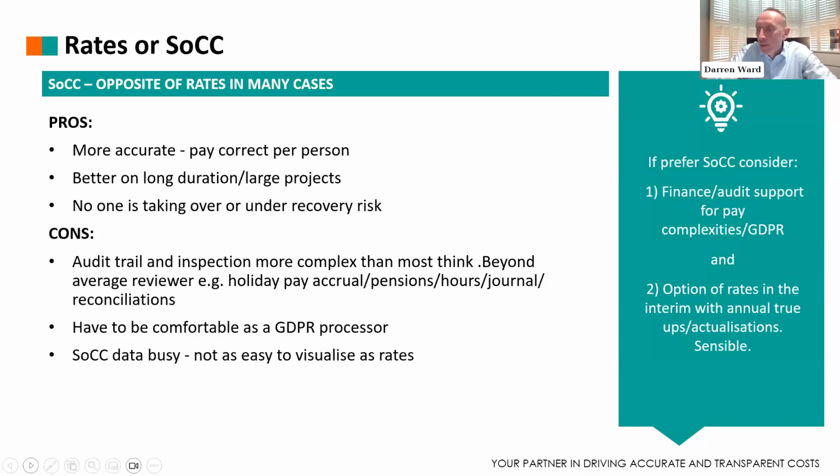Yeah. So if we then look at the schedule of cost components, well, in many ways, the pros and cons will, of course, be the opposite of rates. So the pros are always more accurate. You are paying the correct cost per person, or certainly should be. I feel they're better on long duration or larger projects, and no one is taking any sort of over or under recovery risk. But they don't come without the complications.